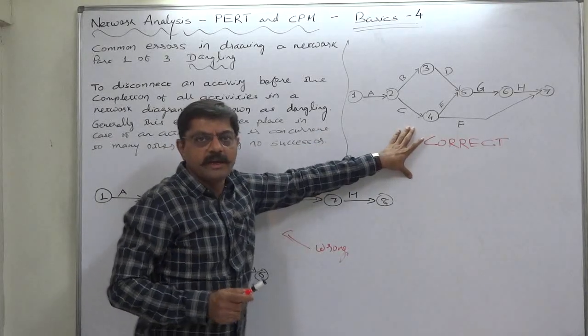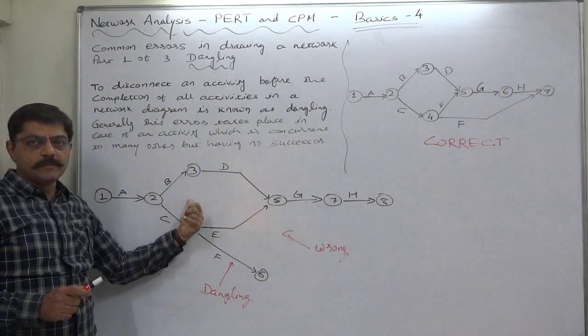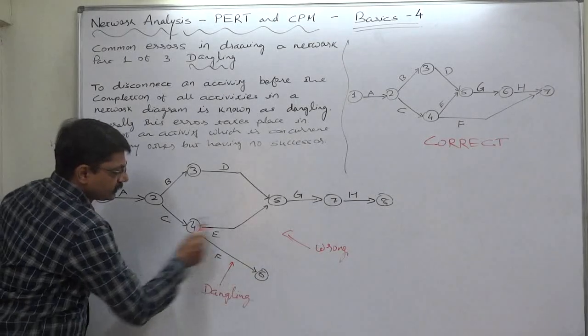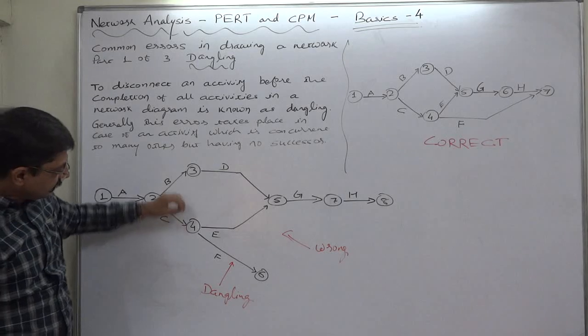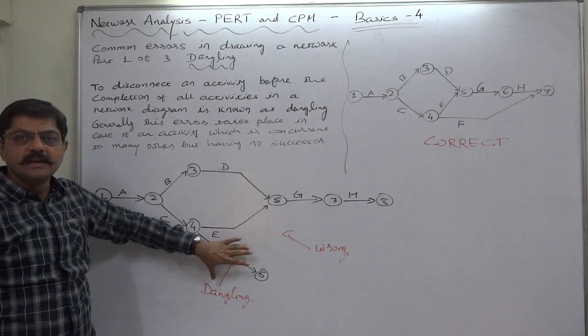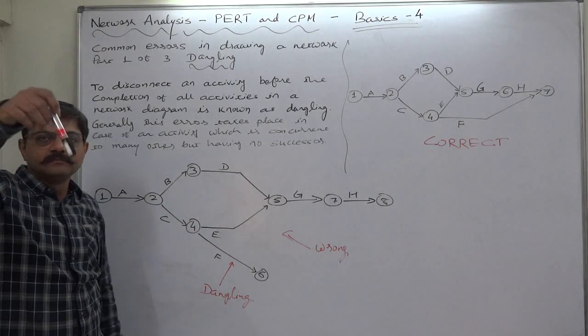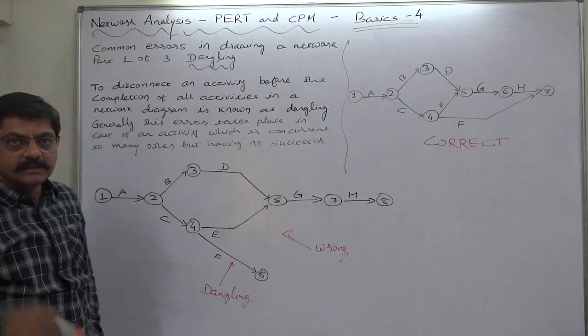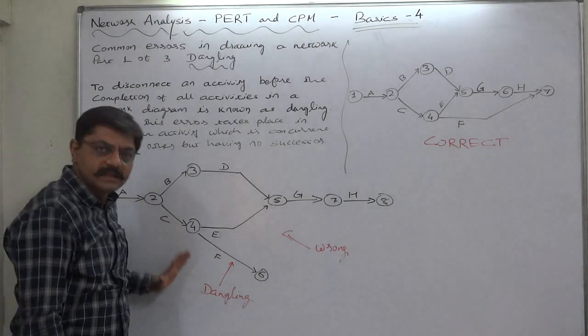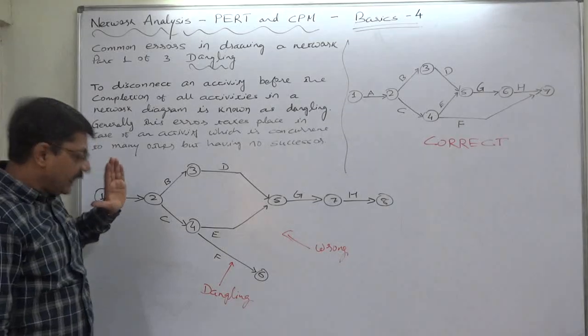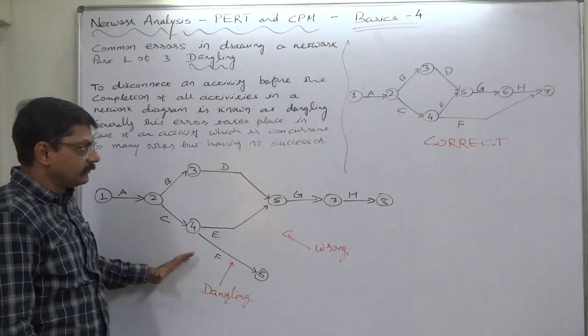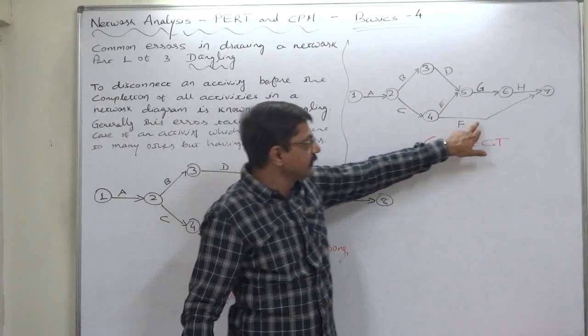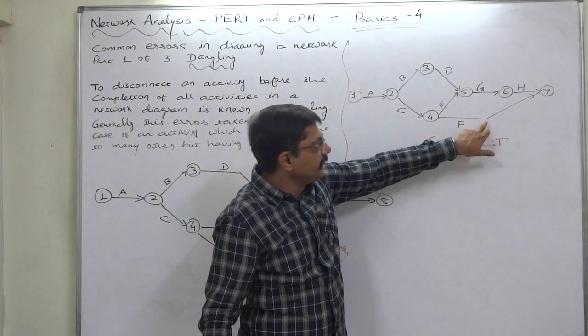...way of drawing the network diagram of this particular project. This is called the situation of dangling. The activity—it is something like event 4 is holding activity F loosely. This is not the correct way of presenting an activity having no successor in the network diagram. This is the correct way of presenting an activity having...